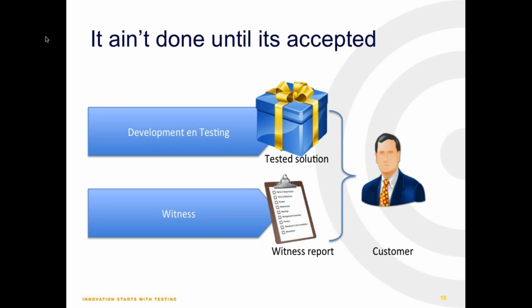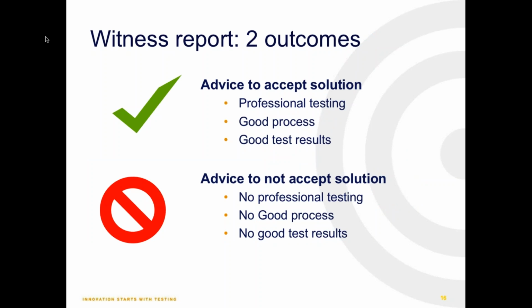Do you trust them? So we came up with some kind of witness process where we said, as an overall test manager, maybe I should encounter and talk with the people that are in the different parties and tell them what the process is and make some kind of witness report. So I will be standing next to you when they come with that gift-wrapped release, and I will say, I think it's wise to accept it because I've looked at what they did and they did professional testing, they had good processes or good test results. Or I might say the advice is not to accept it. It's your call, but I didn't see professional testing, they didn't have good processes or they have lame test results.